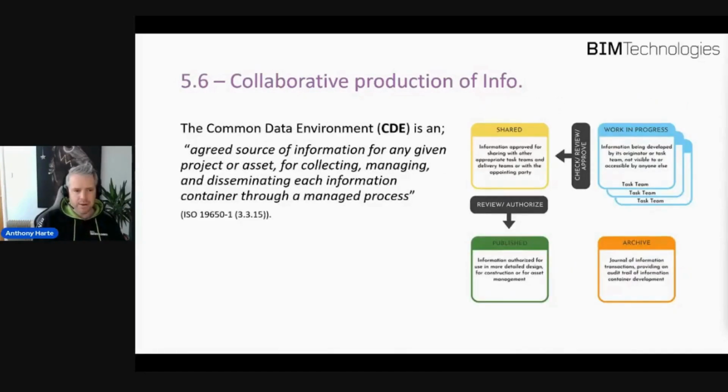I mentioned earlier about a common data environment, and this should be agreed at the outset. Some of the problems we do have is this is never normally agreed as early on as it should be, or you may get various different CDEs as well, or areas in which documentation is shared. And the ideal situation is you've got one area where all your information is shared, and everybody can have an input into the development of the projects that you're working on.